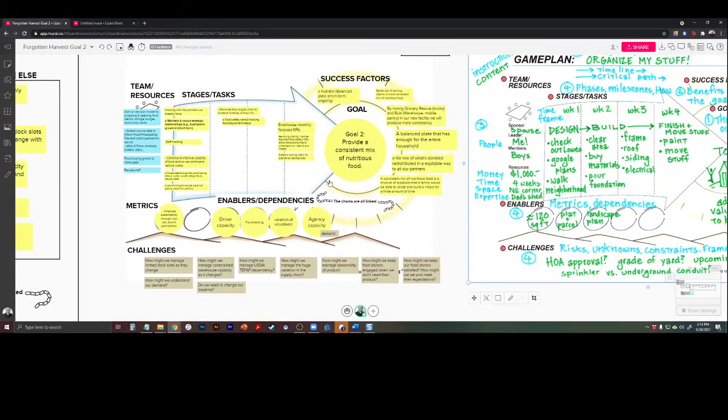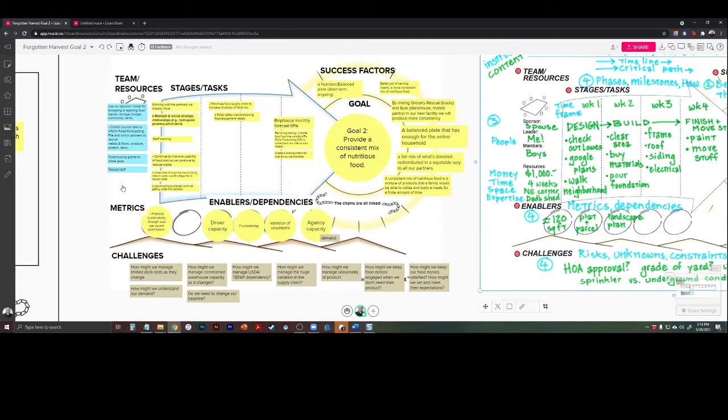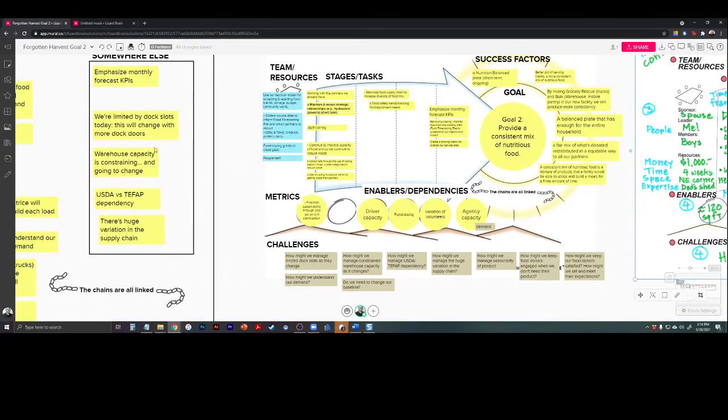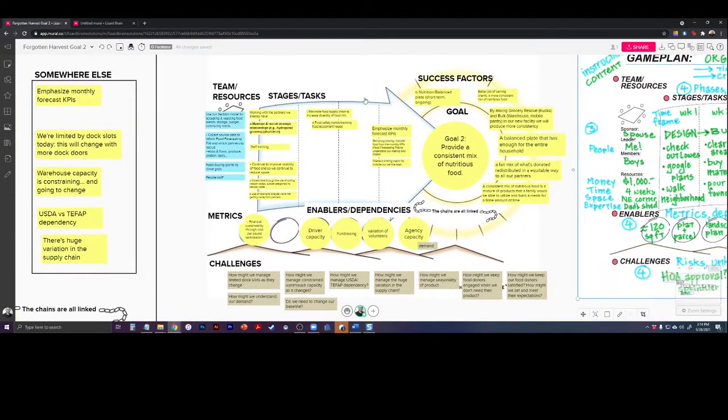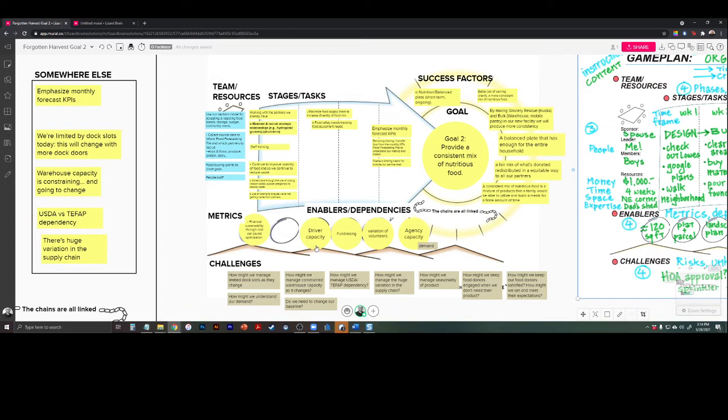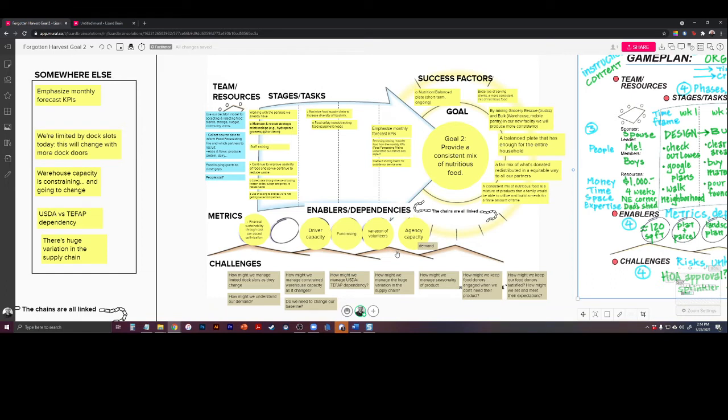Now, if you take a look at what we did, we took most of the content that was over here and found a place for it on the board. I'll get back to enablers and dependencies here. For example, driver capacity - that's not something that Forgotten Harvest controls, but it does make or break their model. Fundraising - they can never be sure of how much money they bring in. The variation in supply of volunteers - who shows up on a Saturday to do this work? Agency capacity - the beneficiary's capacity and their variations in demand is something else that they don't necessarily have control over, but will make or break the goal for them. So we just name it and then move on.